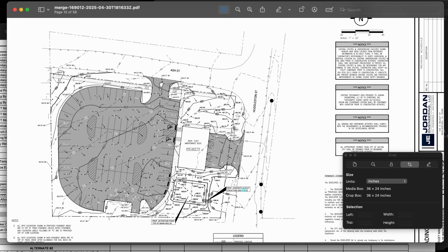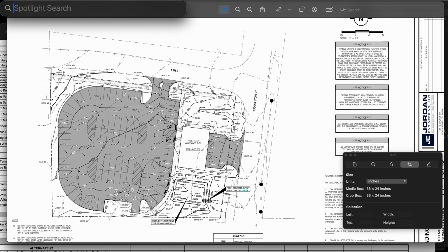So when you break it down into the trucks, if you include in your price as an add alternative, let's just say 50 loads. 50 loads at $500 a load, well, maybe $400 a load. So 50 loads at $400 a load, that is roughly, what is that, 40,000 or 20,000? Let's see, 50 loads times 400 is 20,000.